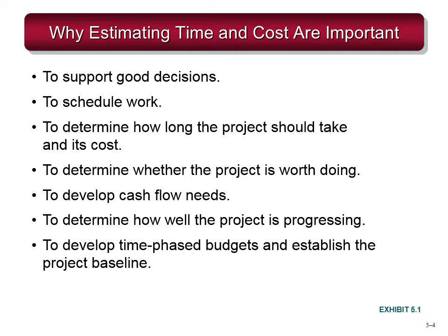It also helps to develop time-phased budgets and establish the project baseline. This enables the project team, when they place the budget to the clients, to do it time-phase wise. Like if a project's total duration is a year, maybe they can have a quarterly budget. And they can understand based on that when the payment will be done.